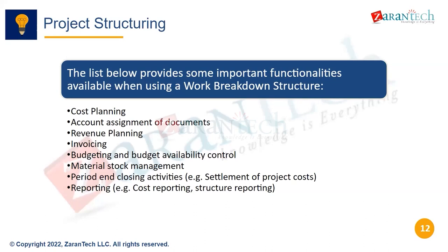So that is why what they do in SAP is they manage that stock at a WBS level. It means when it comes into the plant, they will transfer or do the goods received of that material at the WBS element level. So that is why in the WBS feature, it's saying material stock management is also possible at WBS element. Now, when this is done and how to make it happen, we will see when we go into the